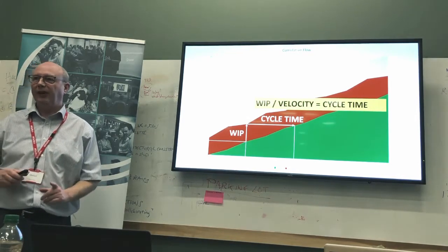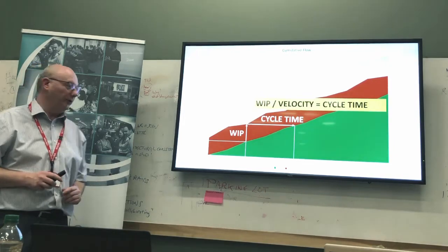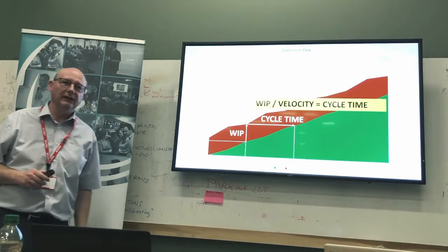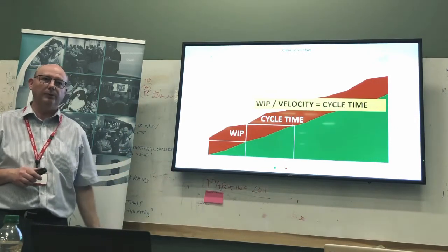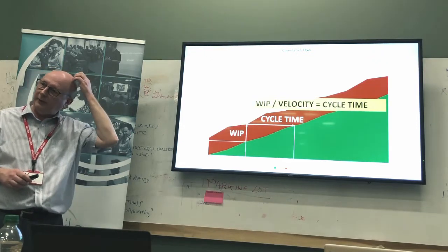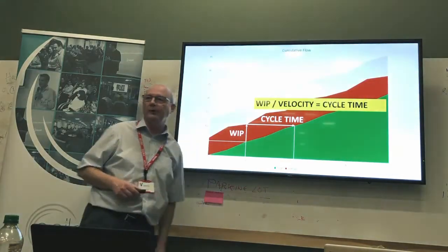If you could say we'll do that immediately rather than instantly, what you would do is you will put that at the top of your backlog, and as soon as somebody's free because they've finished something, they could pick it up. Now this is where cycle time gets really interesting, because cycle time is how long is it going to take before you can pick it up.